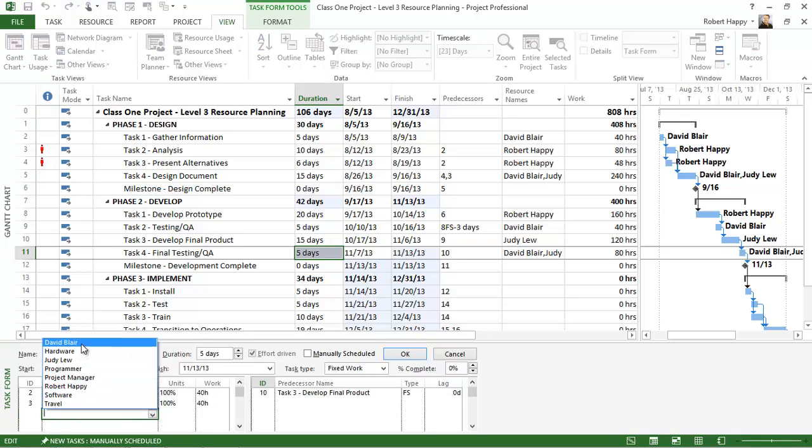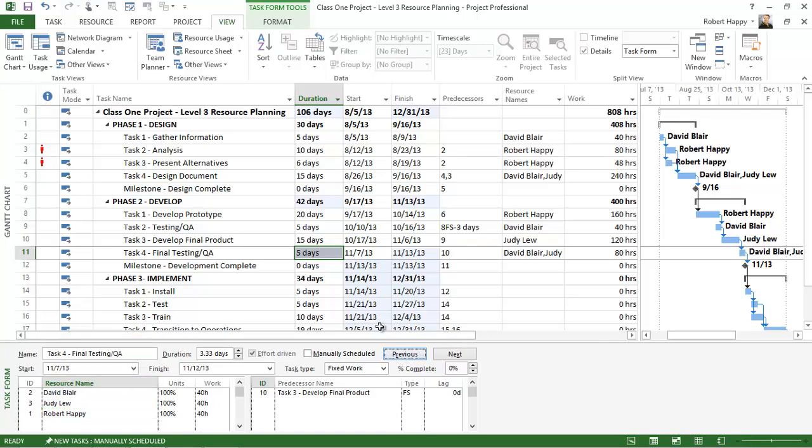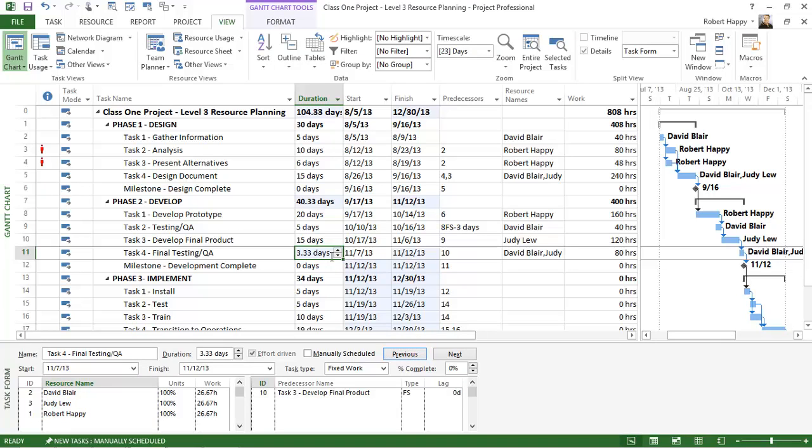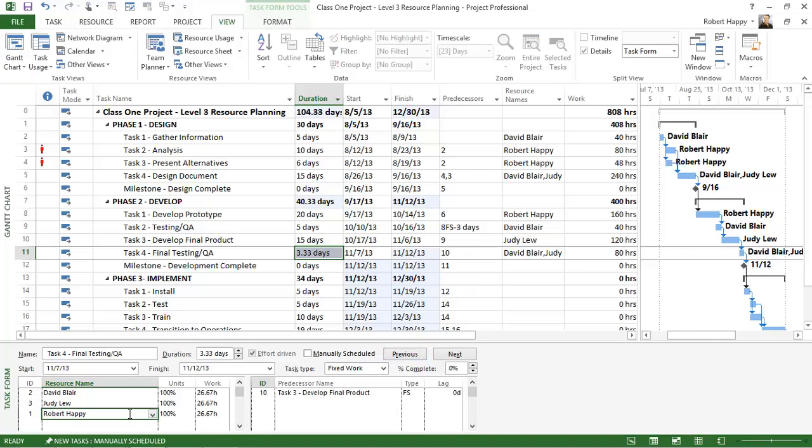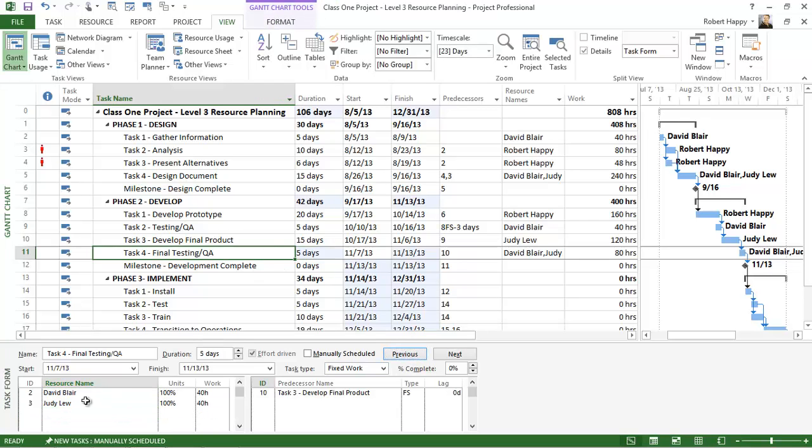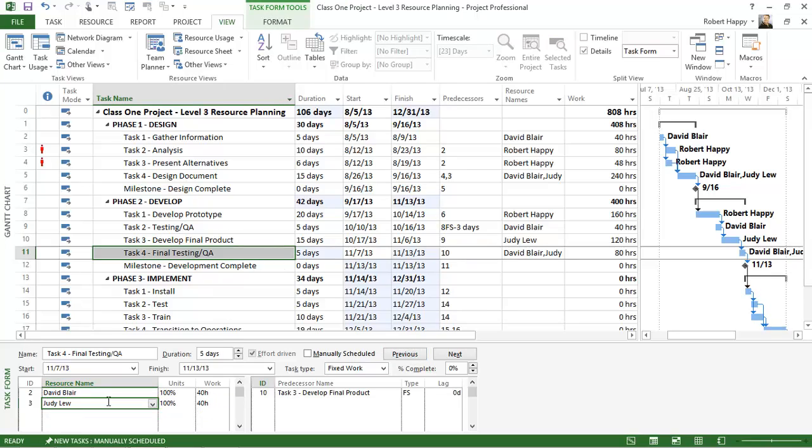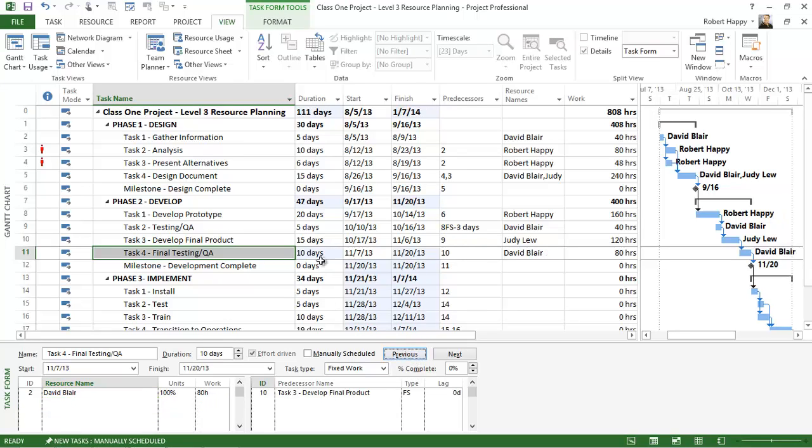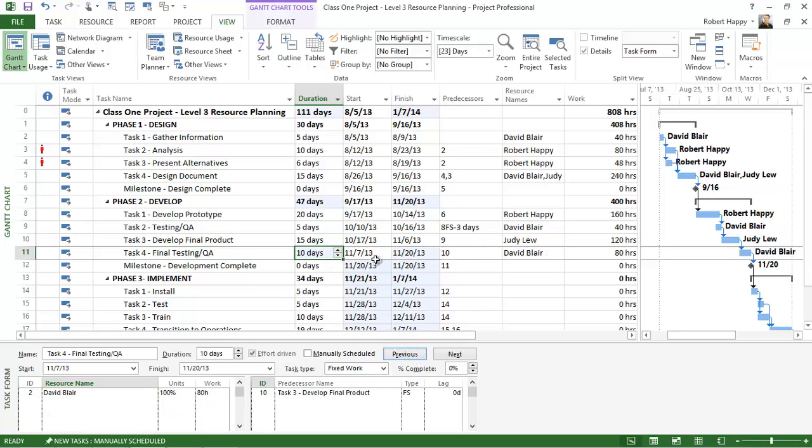So for example, if I choose Robert, click OK, notice the duration goes to 3.33 days. We're sharing that work between us. Or if I take away Robert just by deleting that resource from that assignment, click OK, the duration gets bigger. And if I take Judy off, click delete and click OK, notice that it goes back to 10 days.